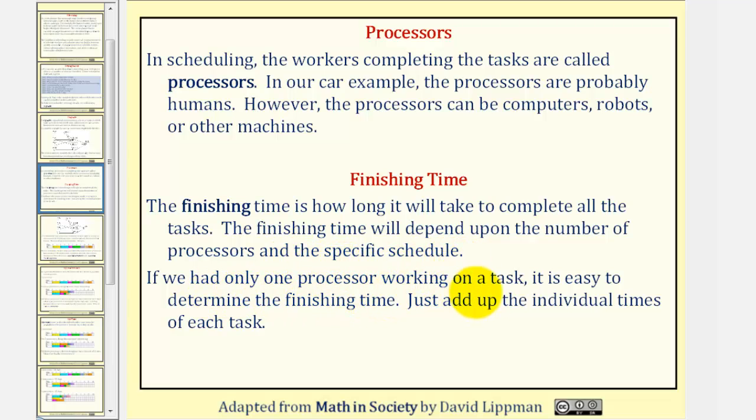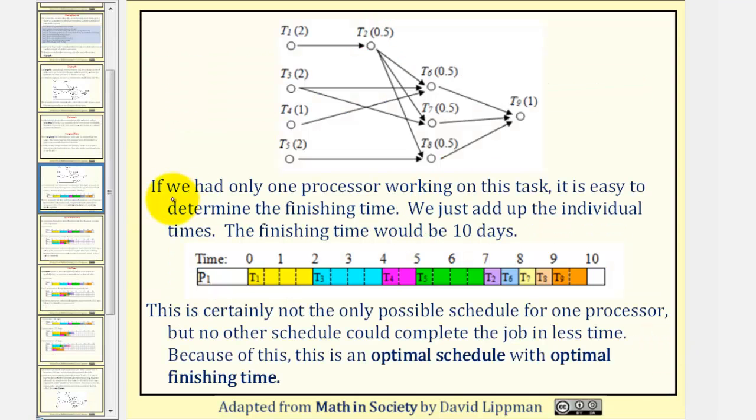If we only had one processor working on a task, it is easy to determine the finishing time. We would just add up the individual times for each task. For example, if we had one processor working on the task of converting this car from gas to electric, we would just add up the individual times, the finishing time would be ten days, as we see here.